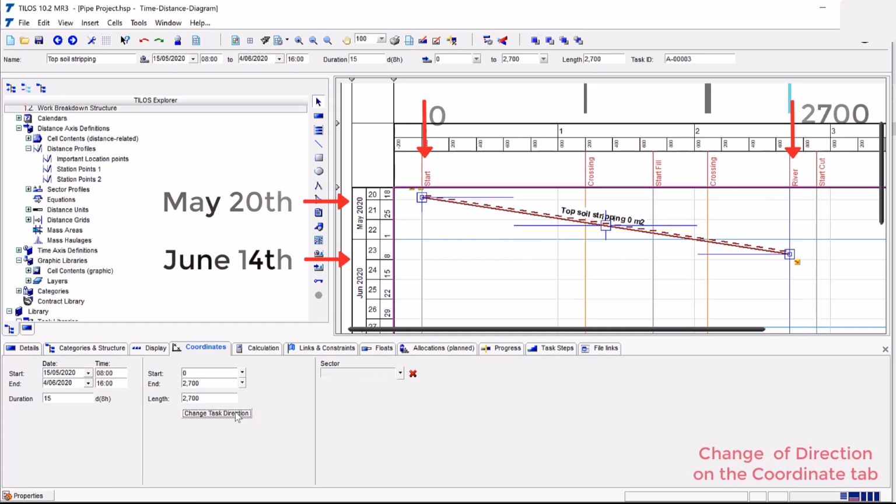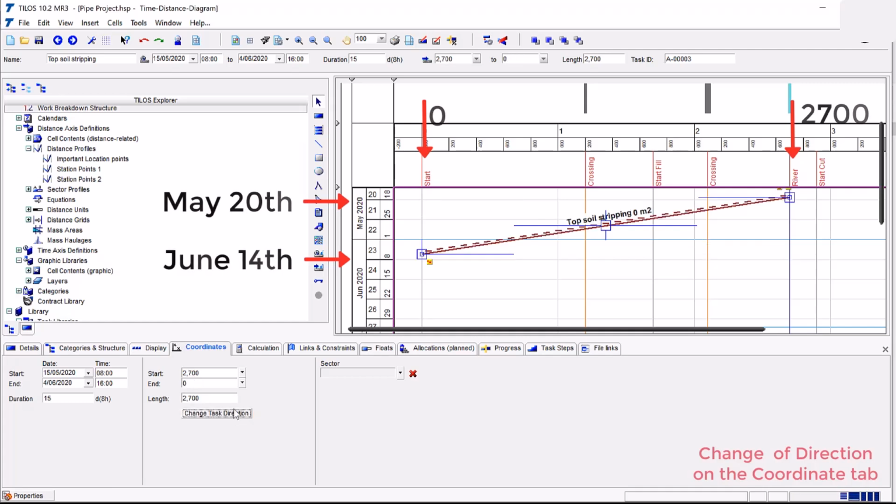When inserting tasks, do not worry too much about start and end dates. You can draw the tasks roughly, according to a graphical plan, and then edit later with exact dates and coordinates. The dates in the table below are taken after rescheduling the final project, so do not be concerned if they differ from your input. The task templates to select in the preset toolbar can be located in different subdirectories, for example Earthworks and Canalization.